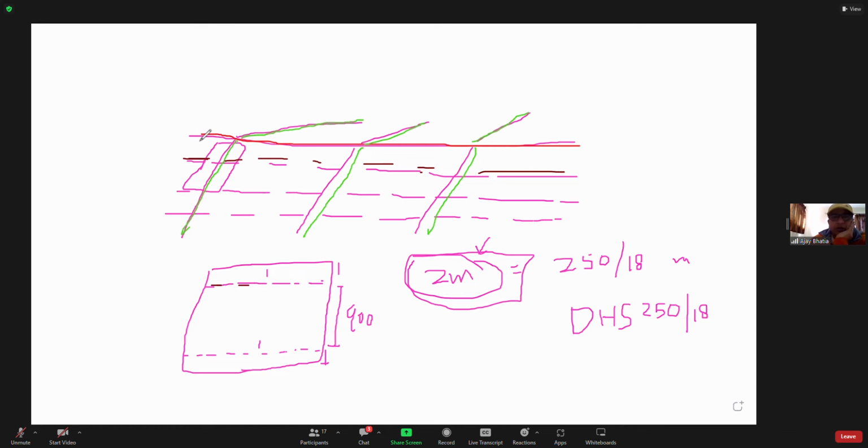One purlin would be about 150 away from this one. And in the end as well, you have got a purlin which is 50 millimeter before your edge. And then you go 900 centers in between. That's how you do it, if you remember your 3604 scenario. So in a normal situation, if I take 1 square meter, you normally get 2 purlins running through 1 square meter area of the roof.